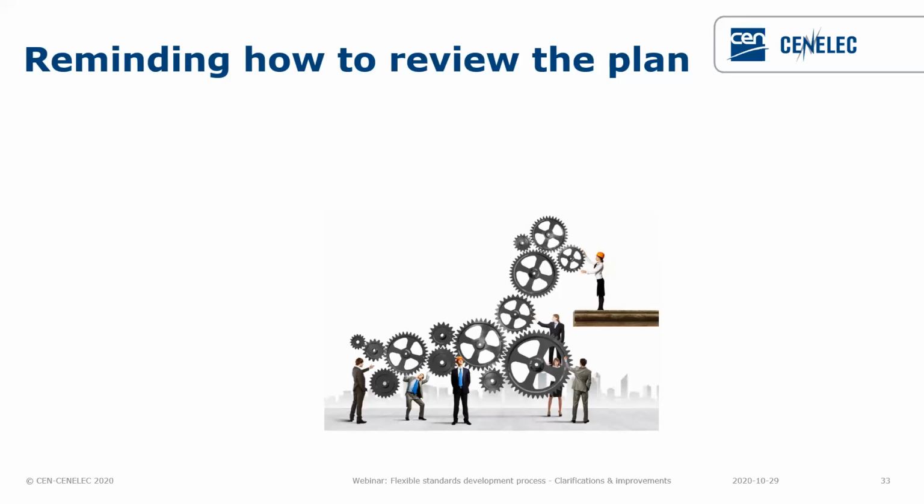Yep. So maybe I can continue with the next question, Alberto, if you don't mind. Yes, because I see another one: do we need a BT decision for the inquiry target? And actually here, when we are in the frame of CENELEC, which means that we need a BT decision for the activation of the new work item, you need to keep in mind that BT will give its approval not only on the scope and the relevance of the project, but also on the target date. So the BT will give a decision on the complete package, I would say. So the inquiry target will be one element that will be decided by the BT when making the decision.